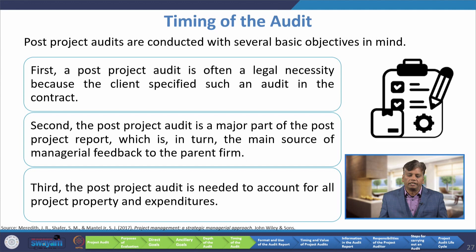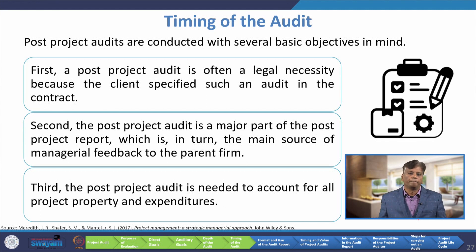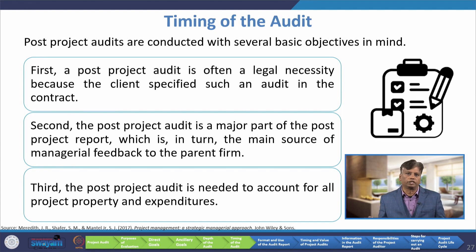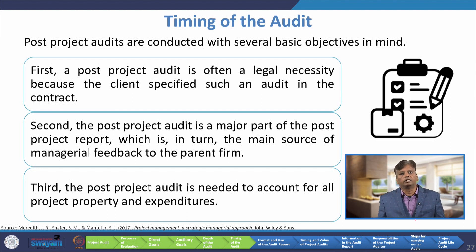Management issues are significant matters of interest for audits made late in the project's life — for example, disposal of equipment or reallocation of project personnel. Post project audits are conducted with several basic objectives in mind. First, a post project audit is often a legal necessity because the client has specified such an audit in the contract. Second, the post project audit is a major part of the post project report, which is in turn the main source of managerial feedback to the parent firm. Third, the post project audit is needed to account for all project property and expenditure.